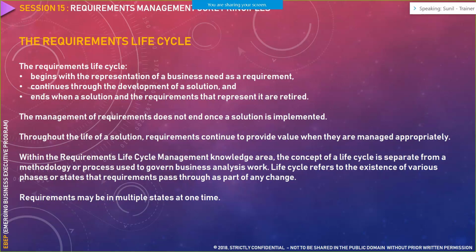So in that case, what would be the requirement state at this particular point of time? So this requirement would be on hold stage. Why would it be on hold stage? Because the dependent requirement is not yet finished. Until and unless we finish the dependent requirement, we cannot pick up this particular requirement.